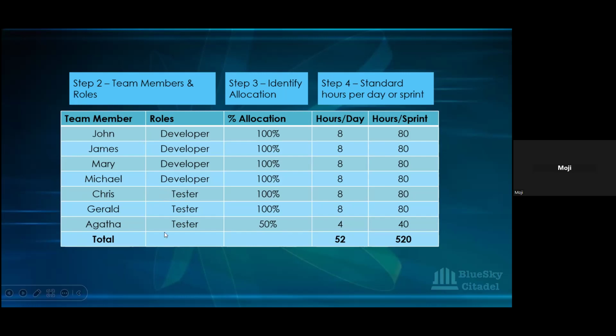What you will have as BA, and which they will have also, is maybe a timesheet where you record, oh, I came in this date, I was off on this. That's done on the timesheet, which goes to HR, or the personnel department and all that. But what we're looking at here for our capacity are the people that are actually doing the coding work. Okay. And like I said, they're limited to just the developers, the software engineers themselves, and the testers themselves. So we have 7 members here, 4 developers and 3 testers.